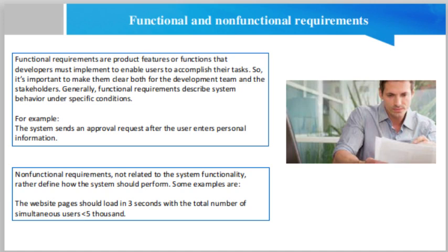Effective acceptance criteria must be testable, concise and completely understood by all team members and stakeholders. They can be written as checklist, plain text or by using given, when, then format. For example, a search field is available on the top bar. A search is started when the user clicks submit. The default placeholder is a gray text, type this name.